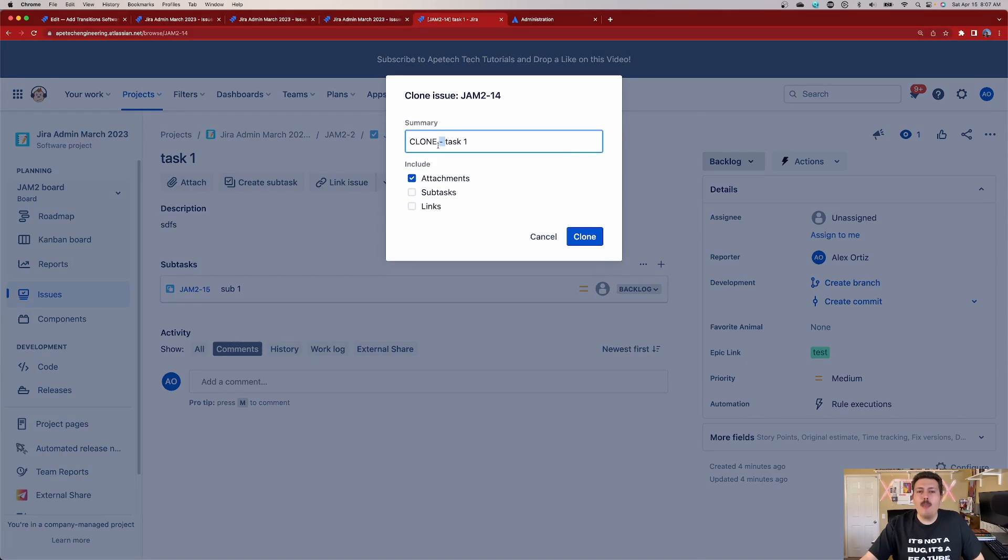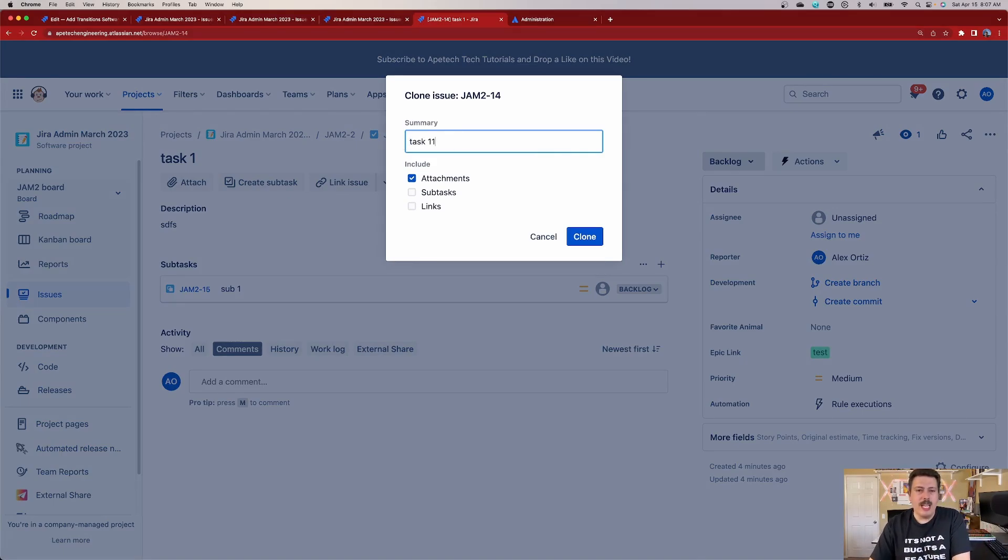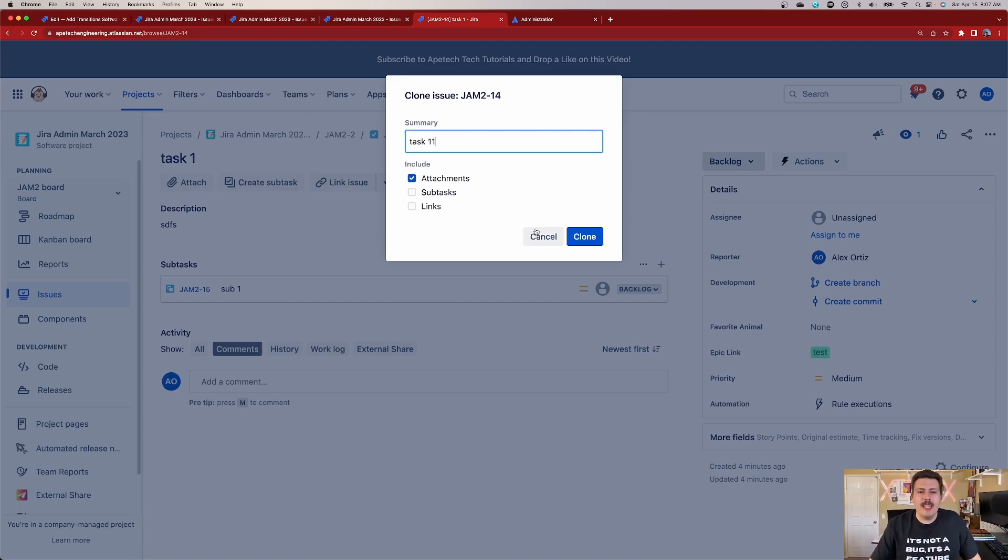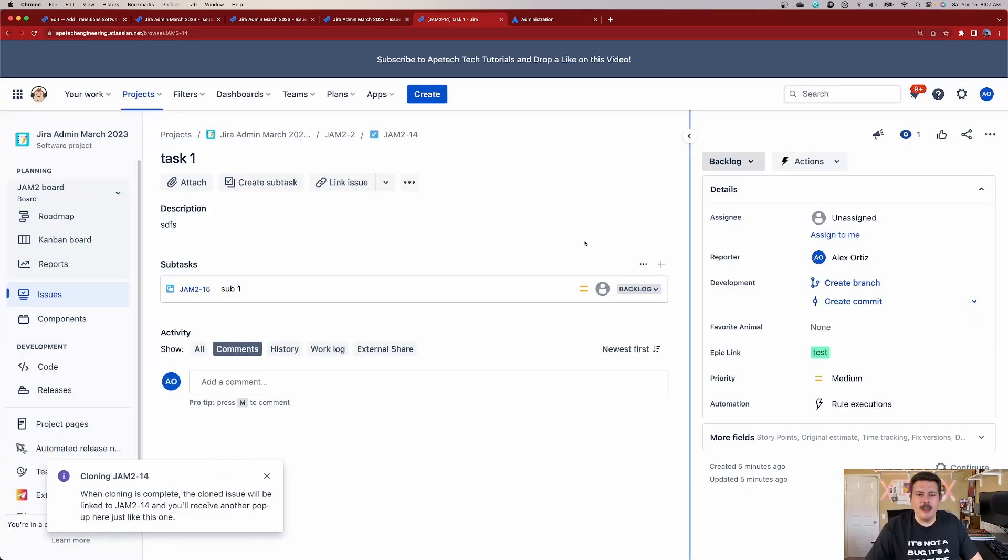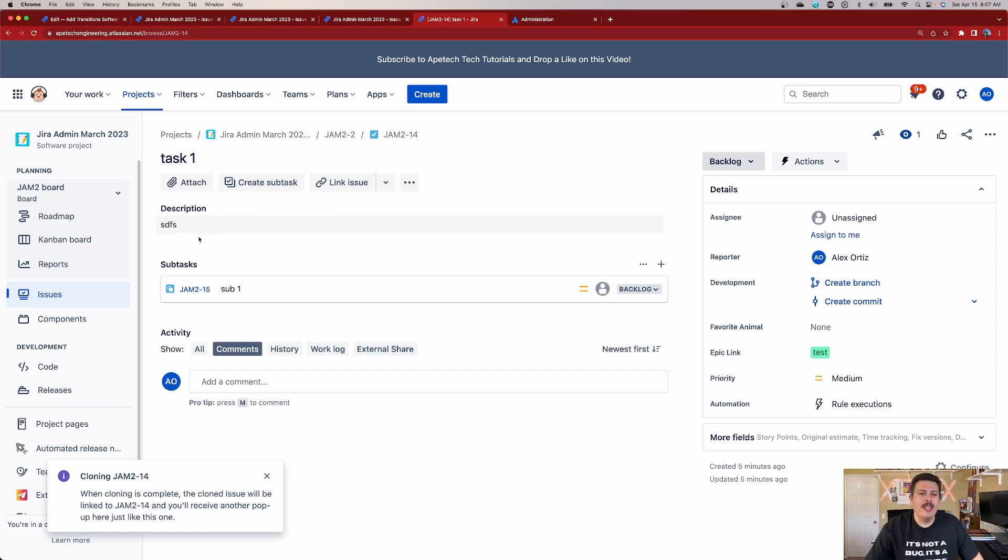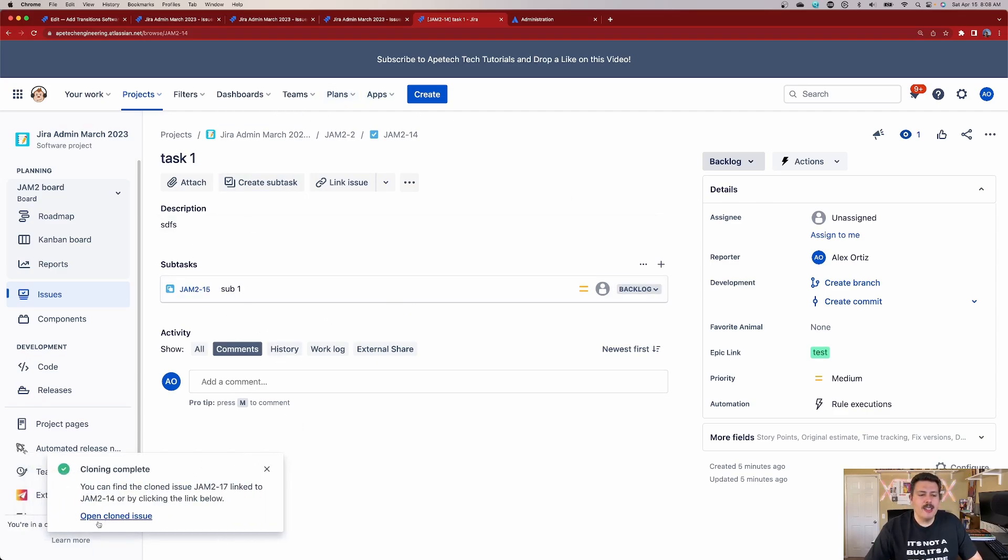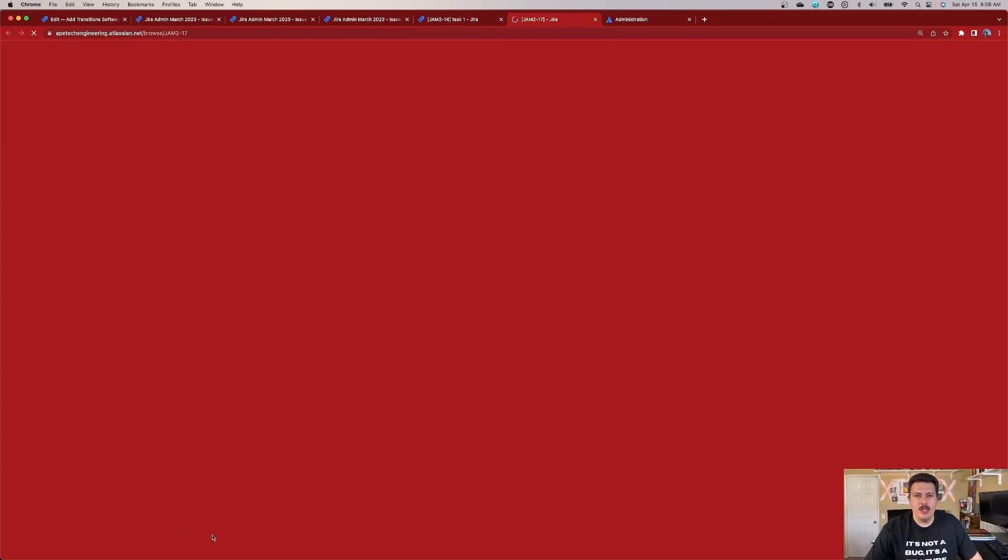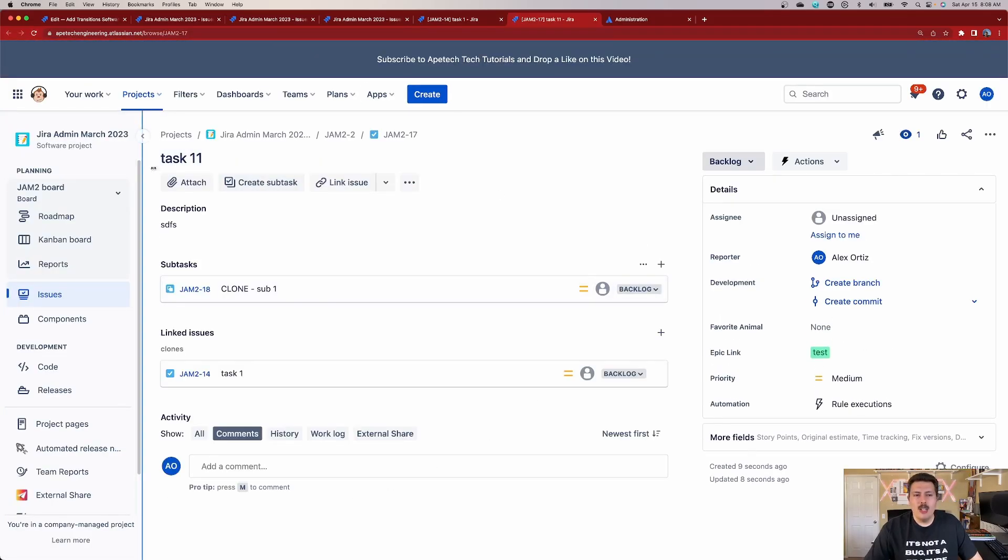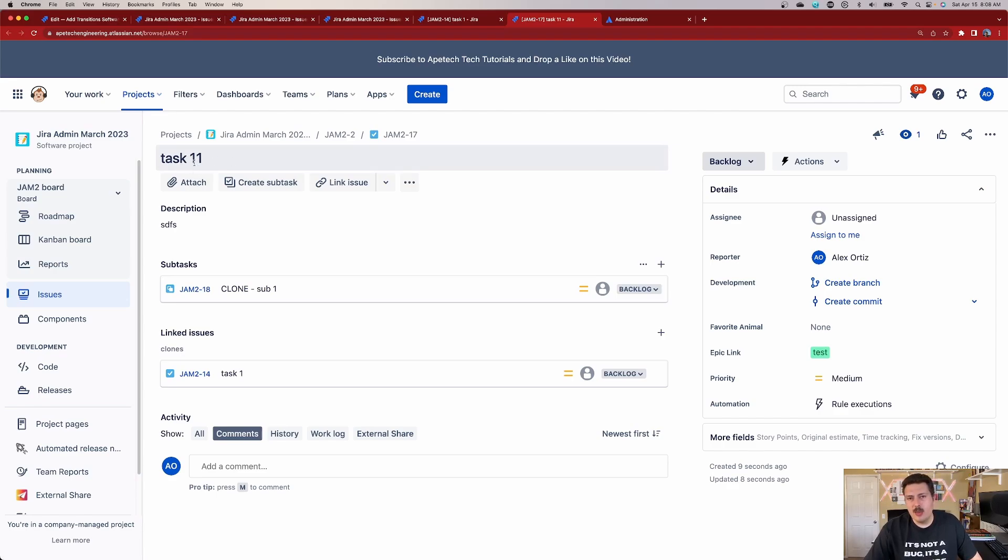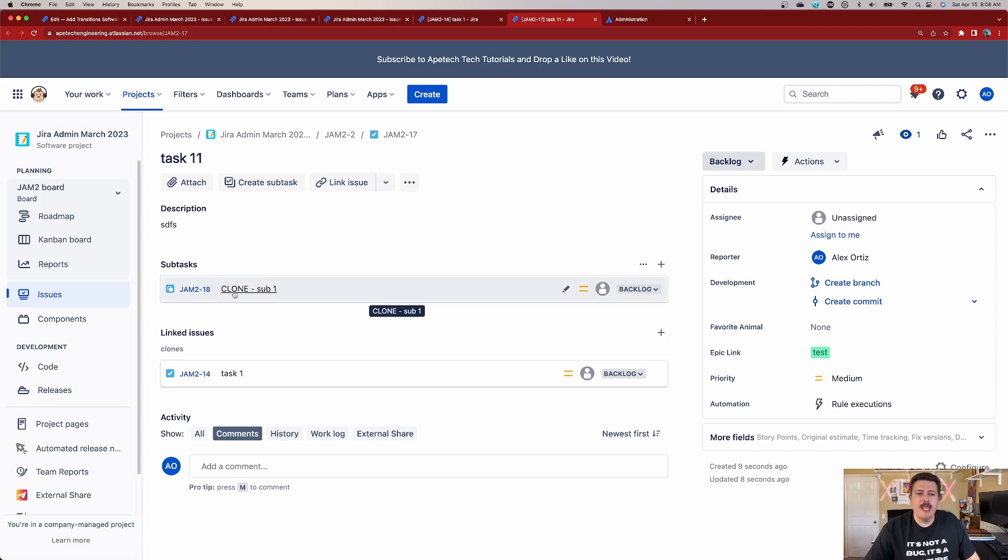I don't want clone, I'm just going to go task 11, but now I have options. I can include the attachments, the subtasks and links. I'm just going to include attachments and subtasks, even though I have no attachments and I'm going to hit clone. When I do that, JIRA is doing its magic behind the scenes, and then you're going to get this notification that you can open your cloned issue. So we'll click on that. Here is our new task. Since I did update the prefix here, this title does not contain the word clone, but I wasn't given the option to update the title of the subtasks.